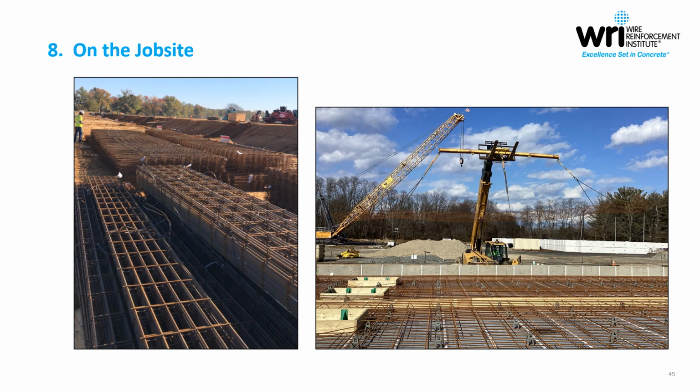There are a multitude of different welded wire reinforcement mat types, and of course they're slated for specific regions of the form areas. You can actually see the tags still affixed to the mat bundles, and that can be really helpful, obviously from a bookkeeping and sequence standpoint. With the material staged and the forms constructed, a small crew in combination with a telehandler, typically fitted with a lifting beam, will make quick work of the operation.